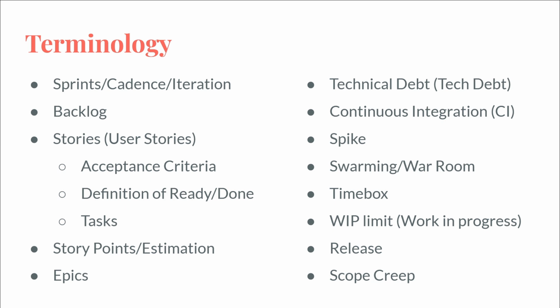So that would be a time where you would do a spike. And a spike is, I'm just going to try this thing out and see what it is. And then maybe I'll put up a PR with my findings at the end. Or maybe I'll have multiple PRs, one for each different approach. And then as a team, we can come together and discuss the findings of this research. So it's kind of just like a research task that may involve some code or may not. And that's usually what a spike is.